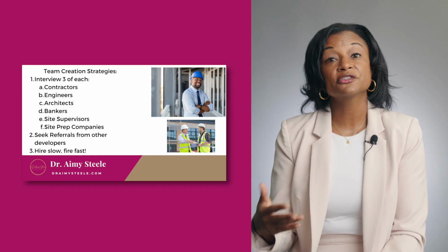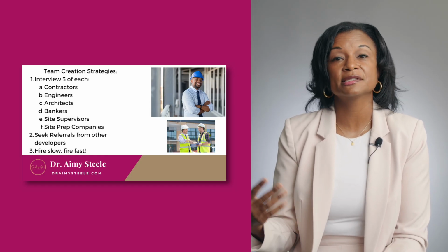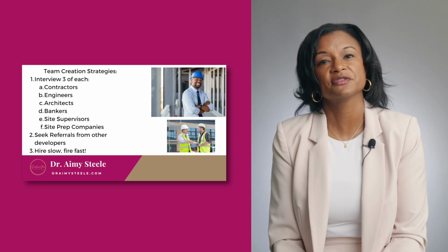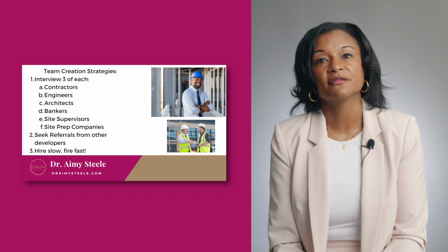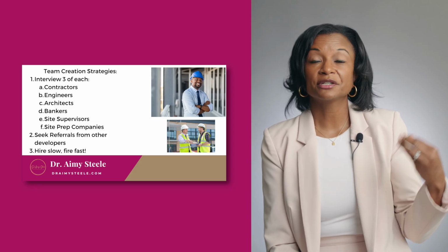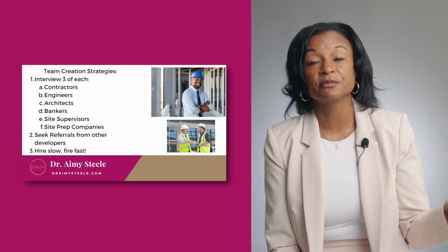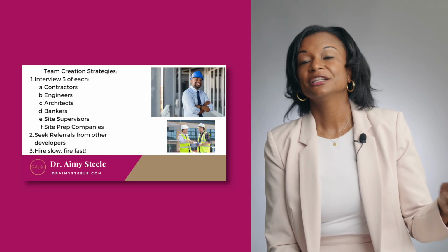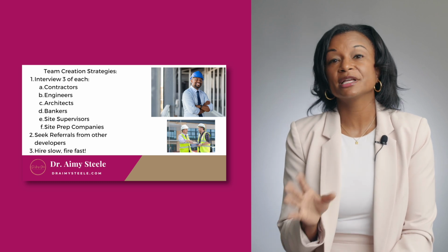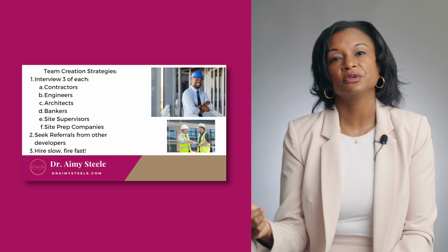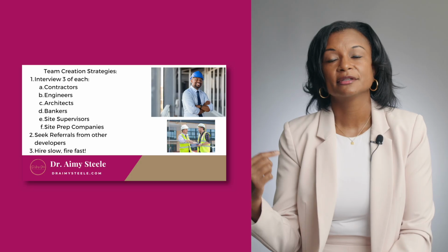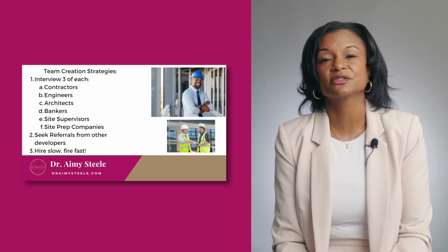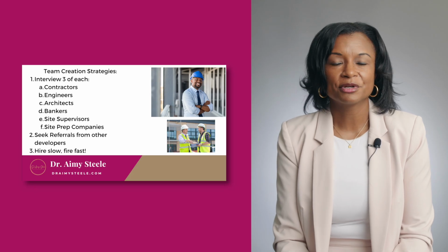But if you are working with a GC, but the GC says, we do this, but we don't do the site supervision, then make sure you have somebody in place. The general contractor could also have their own site supervisor, but you want another site supervisor to watch the general contractor. You can do that too, but make sure that's built into your cost and that you interview 3 so you can understand how you need to hire and who you need to work with that best suits your needs. And then site prep companies.